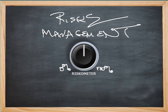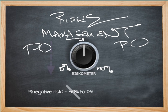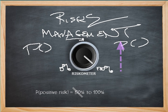This is your job. A way to look at it could be that you have a probability function P on a negative risk. If it is viewed as being 50%, which is up here in the middle, then it's your job and your team's job to reduce that as low as possible. In the case of a positive risk event, you are to increase the probability. That could be shown by turning your risk-o-meter up. This is also your job.